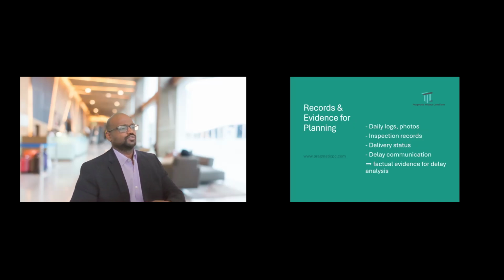Records and evidence for planning. Planning is not a standalone requirement or operation. It depends on the inputs from all the departments around it, like daily logs, photographs, inspection records from QA/QC, delivery status from the procurement department, and delay communications between the employer and the contractor. So many factual evidences are involved for the delay analysis methodologies.